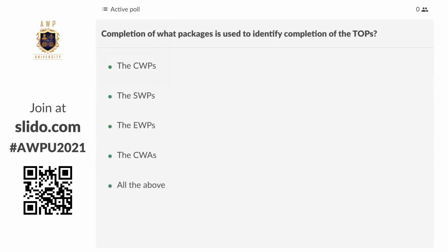All right. Completion of what packages is used to identify completion of the turnover packages? Okay, is it the CWP? Well, it wouldn't be a CWP for the completion of a turnover package because a turnover package typically follows system boundaries or portions of system boundaries.